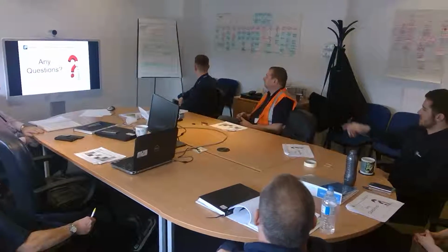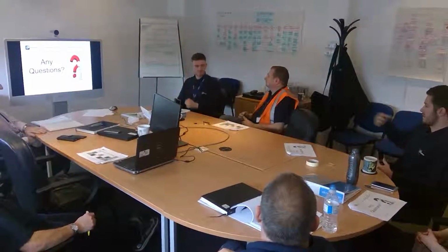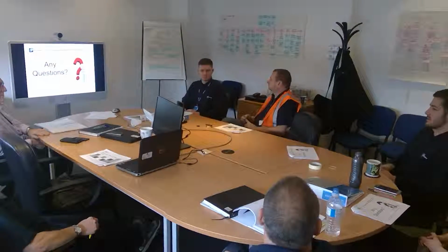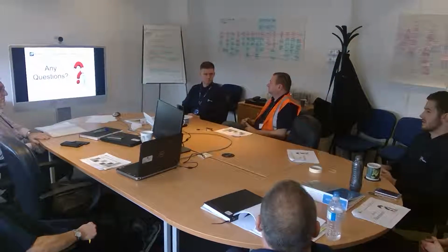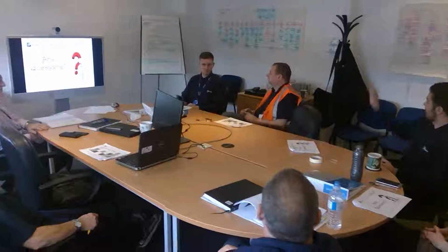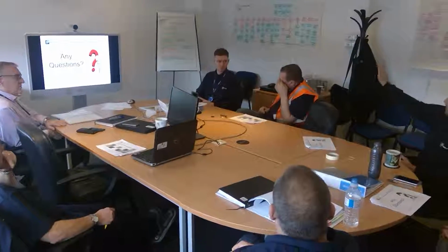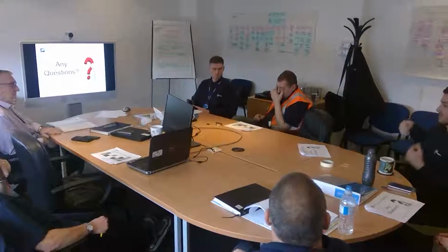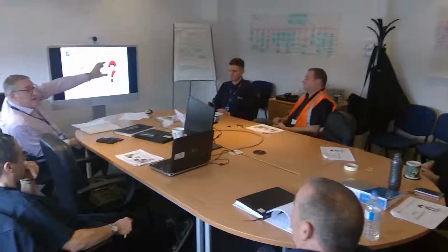So like Jay was saying, get the weld shop involved at 30%, 60%, 90% tech reviews. I can highlight stuff up. I can say, they're going to be long leads, you need to order them now. How are we going to manage that? Matt, we need some tooling, stuff like that. So it'll eradicate it further up that way, rather than getting to here and just having a load of stuff dropped on us.